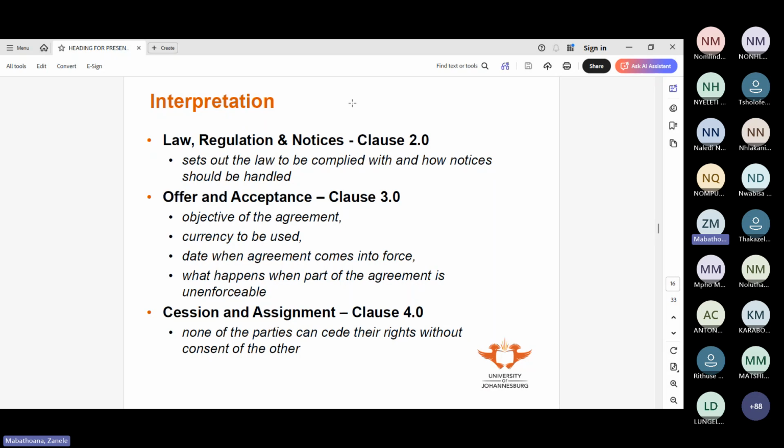The contractor also shall not consent to a nominated subcontractor ceding or assigning rights and obligations under this agreement without prior written consent or approval of the principal agent. So if your nominated or selected subcontractor wants to cede their rights, the principal agent is to be notified, and then they have to agree to it. Not just notification, they must also consent.